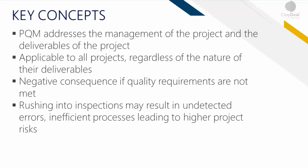In either project, you need to meet quality requirements provided by the customer or internal stakeholders. For example, meeting customer requirements by overworking the project team may result in decreased profits, since you're spending more time, resources, and money, and it also increases project risk — employee attrition, errors, or rework. Similarly, meeting project schedule objectives by rushing planned activity inspections may result in undetected errors and decreased profits. You want to remain within scope, not incurring too much cost, while still delivering a quality product.